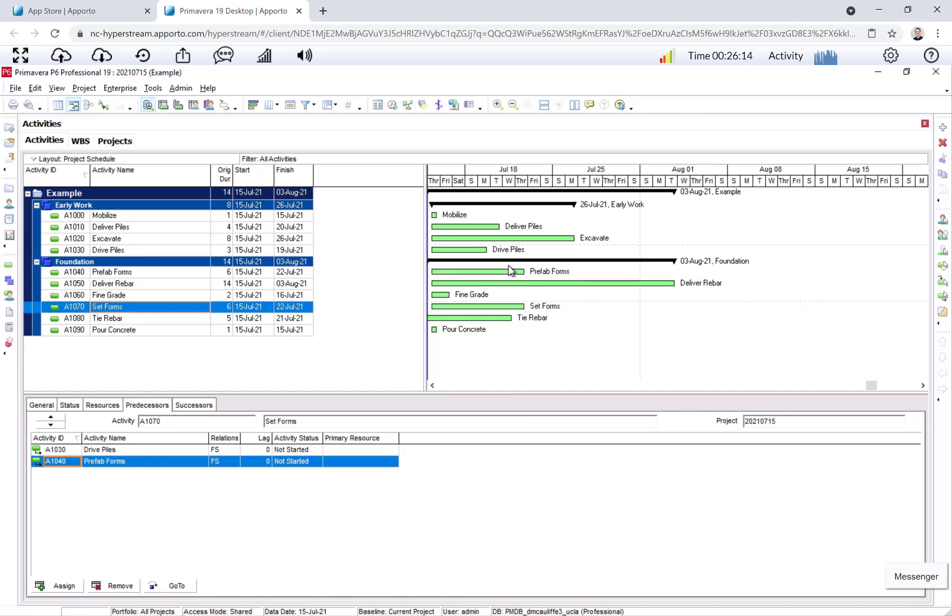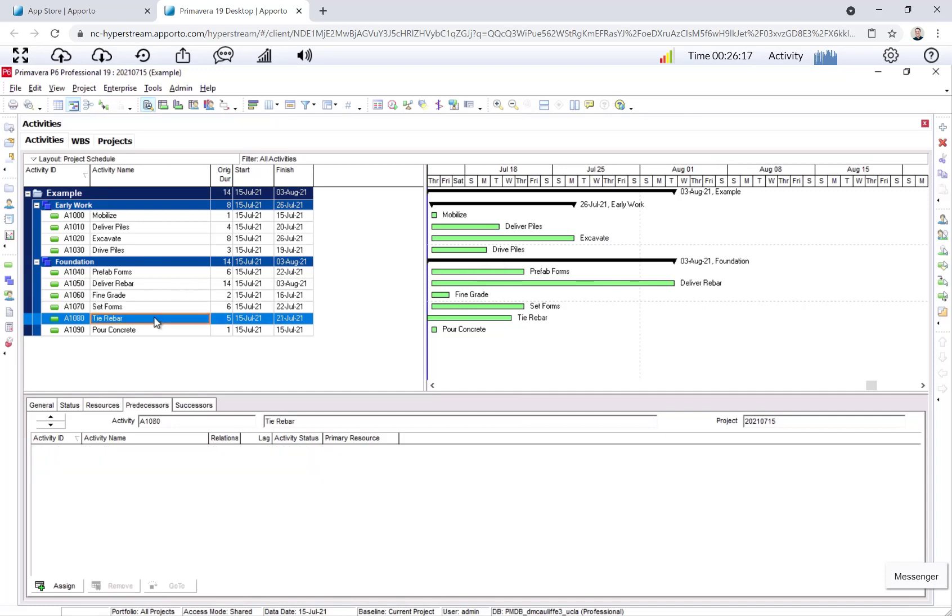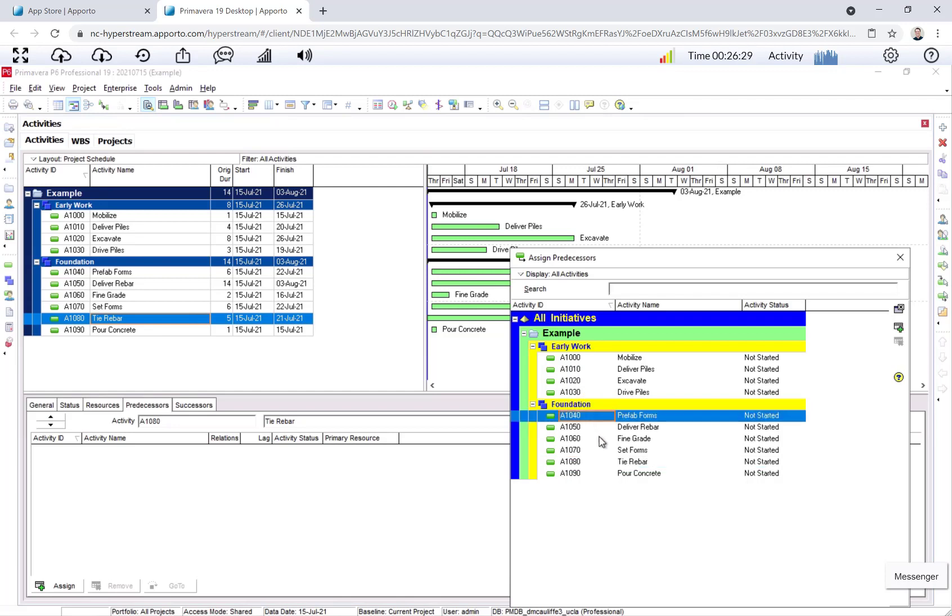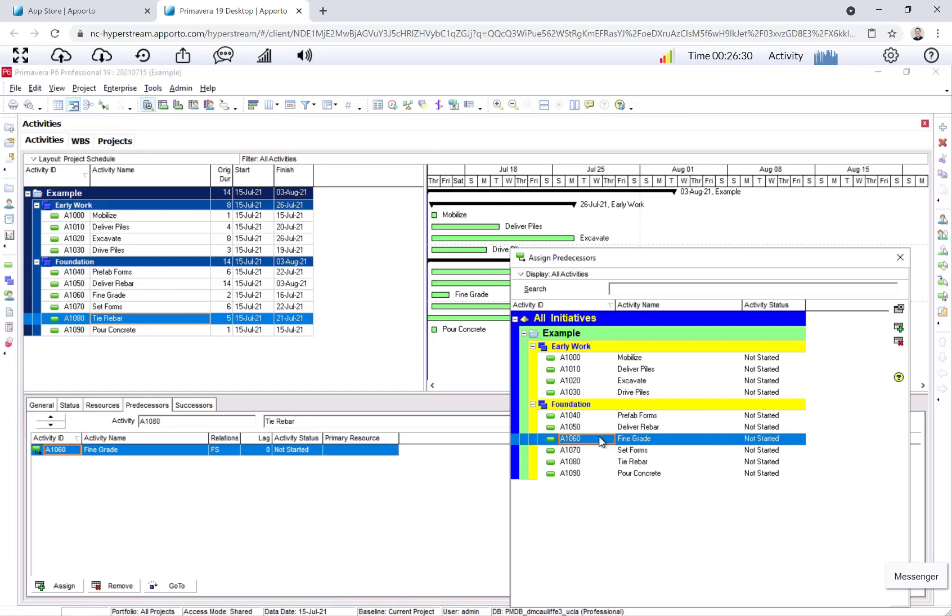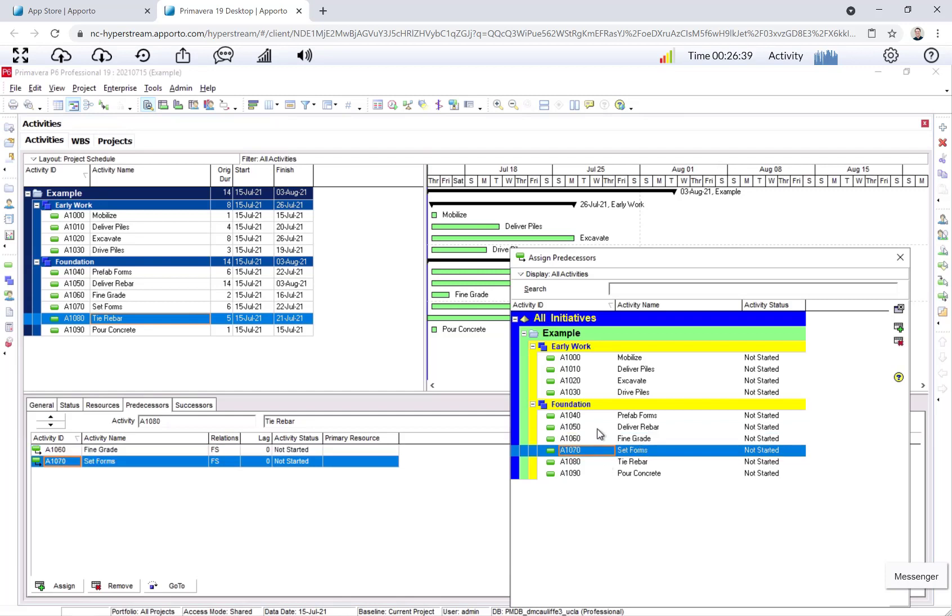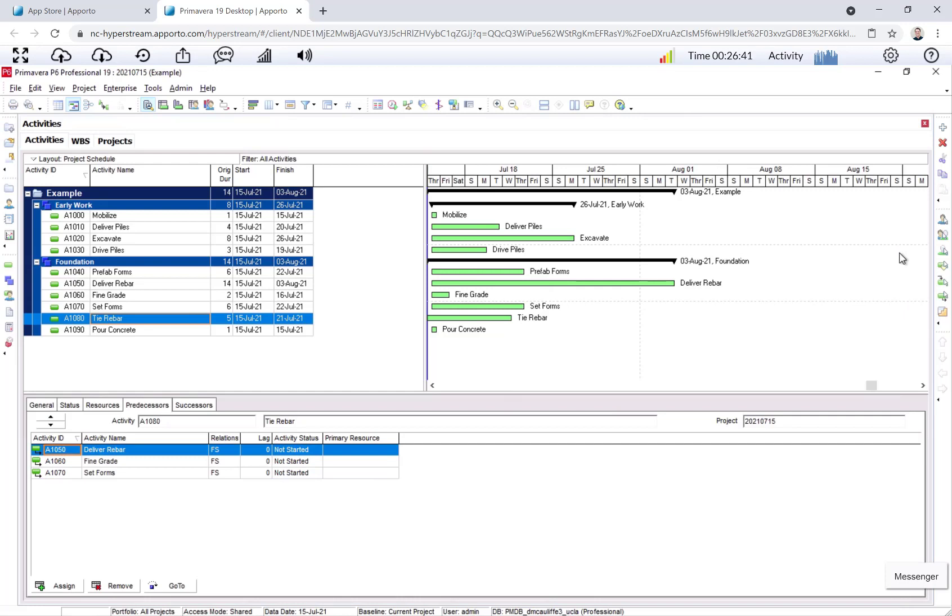Now we can go to tie rebar. Tie rebar, we have three predecessors. We have fine grade, set forms, and deliver rebar. Predecessors, assign. And notice I'm just double clicking. You can click and then hit the plus, or just double click. Fine grade, set forms, and deliver rebar. Okay.